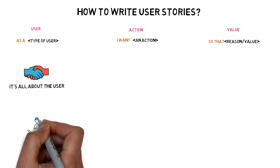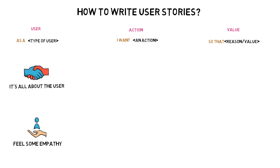Feel some empathy. Give your user a name. Think of their habits — what issue your app is going to resolve for them, and how you're going to make this path easier and faster. Once you have a few groups of end users, the next step is to define what functionality each user expects and how they're going to use the product. A basic rule when writing an action for a user story is to have one action per story. For example, if you want to write: as a customer, I want to browse items and then add them to the cart — it is better to split it into two different user stories.